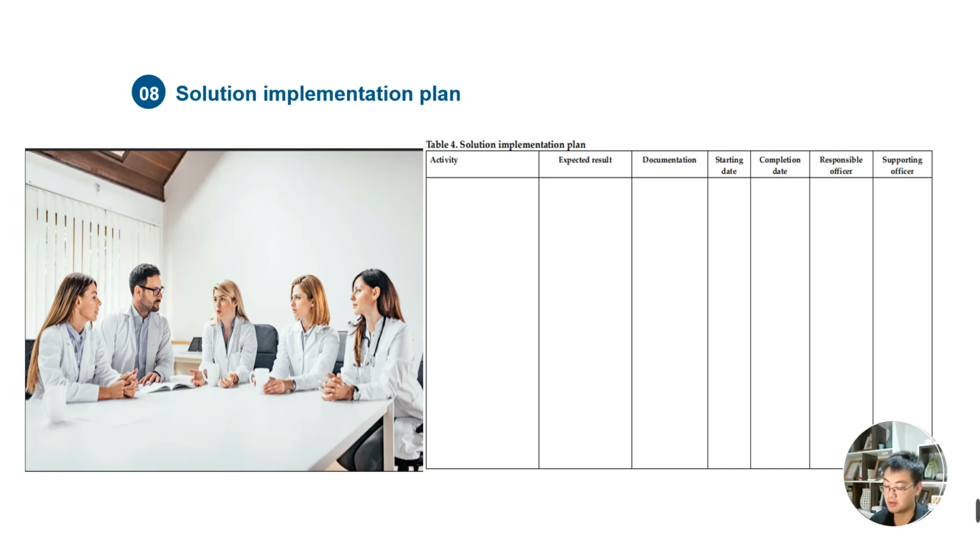For example, training requires preparation steps: interviewing trainers, developing training programs and materials, budgeting and identifying resources.